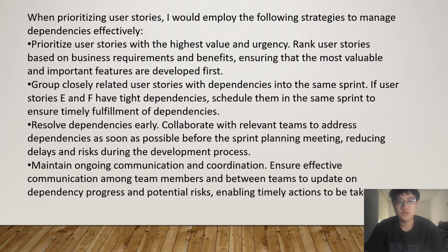If user stories E and F have interdependent schedules, schedule them in the same sprint to ensure timely completion and resolve the dependencies early.